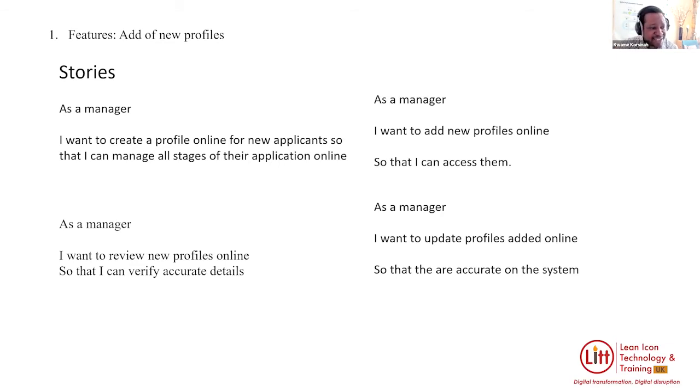Our stories are: as a manager, I want to create a profile online for new applicants so that I can manage all stages of the application online. As a manager, I want to review new profiles online so that I can verify accurate details. As a manager, I want to add new profiles online so that I can access them. As a manager, I want to update profiles added online so that they are accurate on the system.